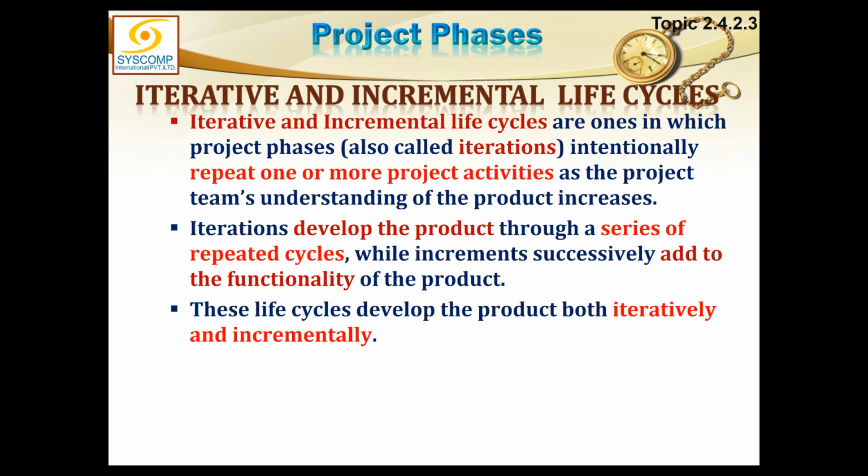Another example, as I was saying, normally used in IT, is called the spiral model. Spiral model is you go through a life cycle. You have to produce something big, but you don't want to experiment with big. You start with small. So I have to create a big, very comprehensive program. First I say, okay, let me create a small little model. We will create the model, test it and see. The first cycle, the inner cycle, is testing the small little model. If that is successful, then we go a level up, a bigger experiment, then a further bigger experiment, then a further one, this spiral will open out until we reach a target.